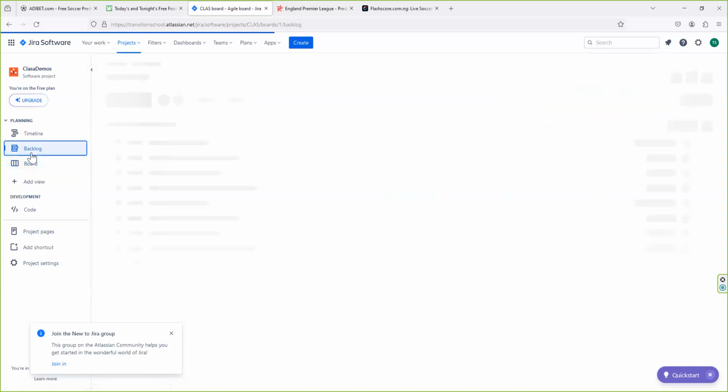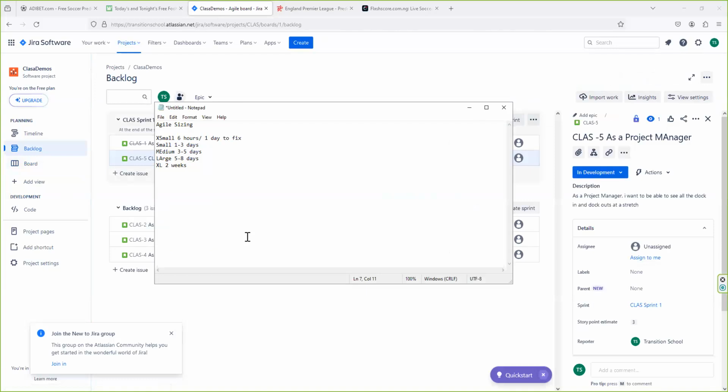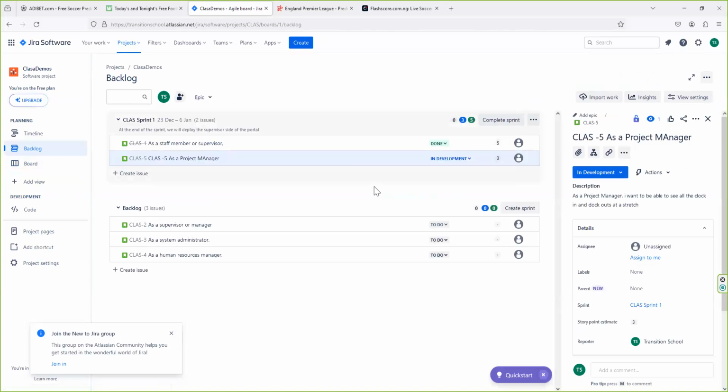During that period when your engineers are working on it, there's usually what we call backlog grooming. I'm sure if you watched the last video, you see. So we call it backlog grooming. Basically, this means that items that we want to put into another sprint, we'll start looking at them, fine-tuning them, checking them to see if there are any issues that we need to address, and then we start to work on them as is.